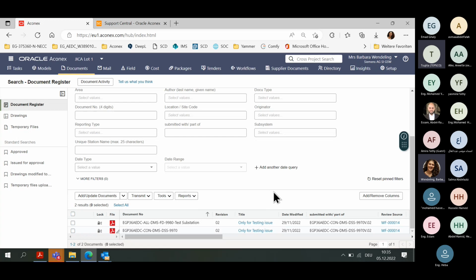So that means you have to upload this Excel comment sheet after you updated this Excel sheet. Therefore, in the document register, it's not possible during a workflow to upload a new document. Under supplementary file in the workflows, we can do this, and I will show this later.